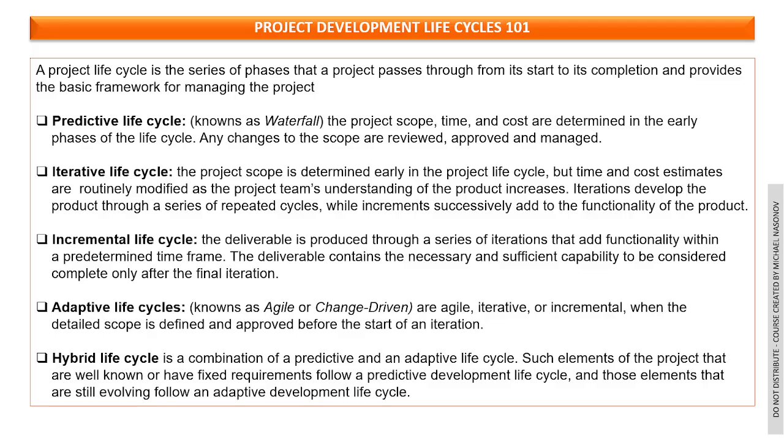Adaptive life cycle, known as agile or change-driven, are agile, iterative, or incremental, all three previous, where the detailed scope is defined and approved before the start of any iteration.